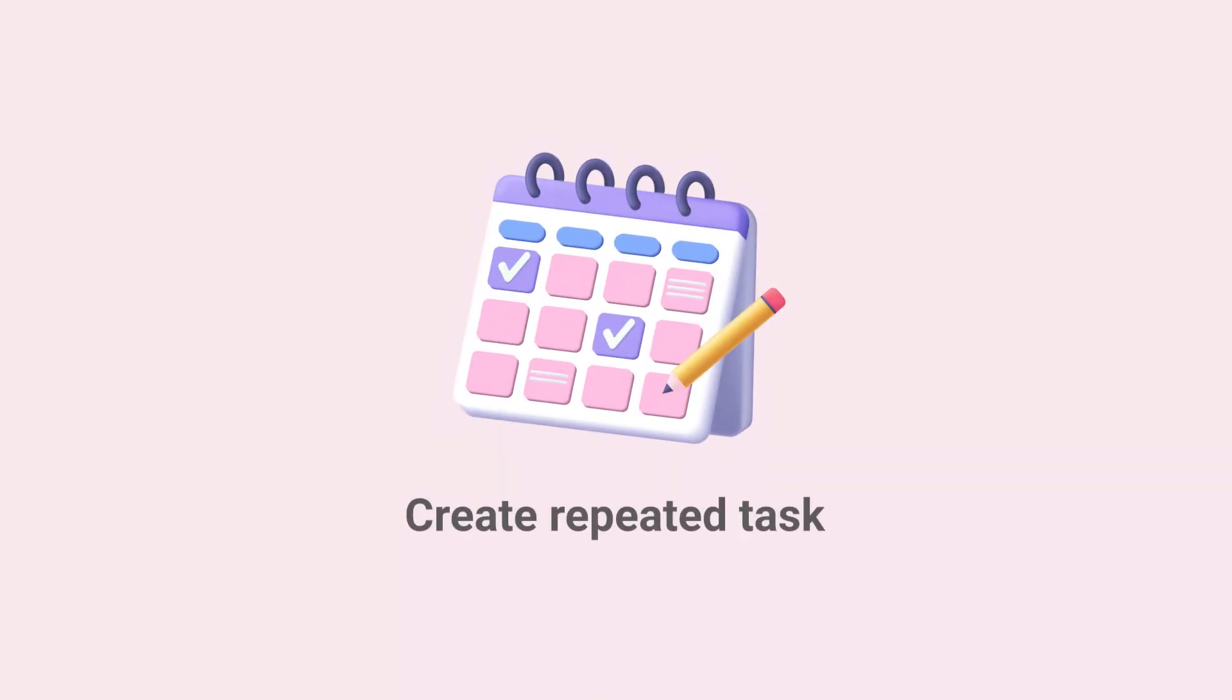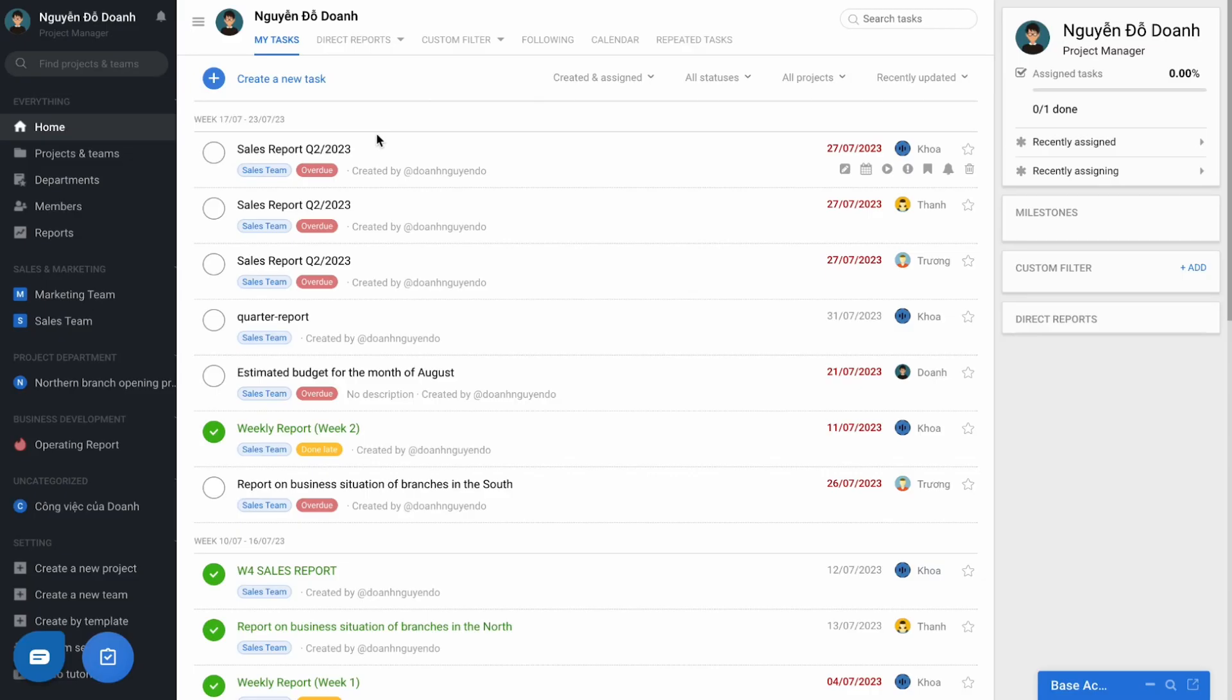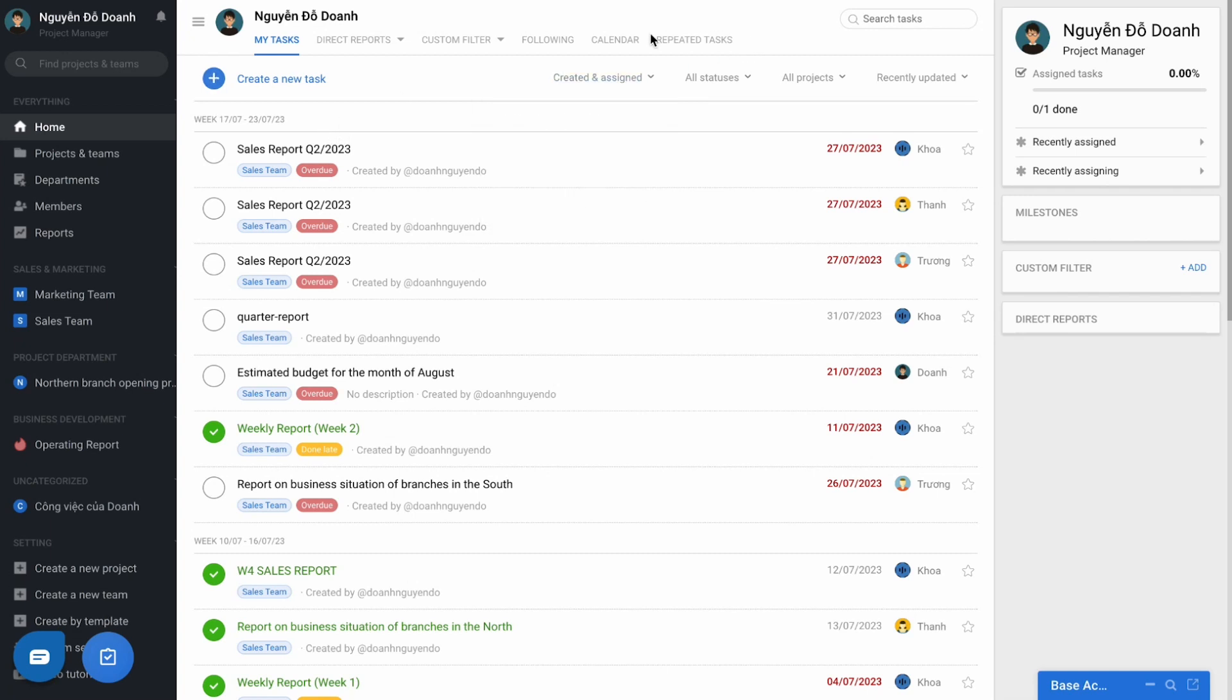Create a repeated task. Besides a single or arising task, the business will have fixed or repeated tasks, such as reporting. Instead of having to constantly create the task, you can set up by going to the home page, using the repeated task feature.